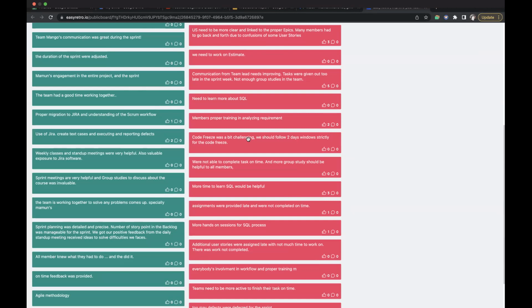Developers only get 8 working days of code changes and modifications to the application. At the end of the 8th day, there will be code freeze. Developers should not touch that code, so QA can do their testing and end-to-end flow and sign off on it. That's the ideal scenario.